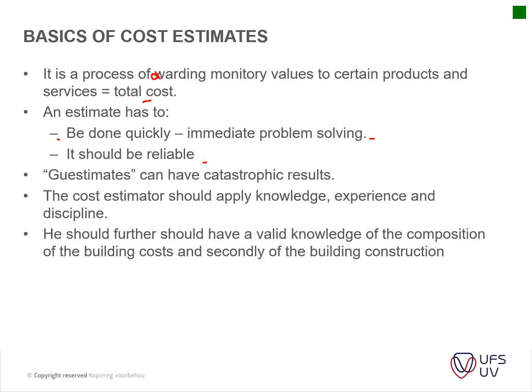He has to know what the influence of the one professional is on the other. So for instance, like I just mentioned, if the structural engineer changes something on this side, it may influence the look and feel of the architectural side as well. Where will the electrical ducting go? Will it fit within this flat roof design? Is there enough space? Air conditioning ducting is usually a big challenge. Do the services clash with each other? Those are the things that he has to look at.